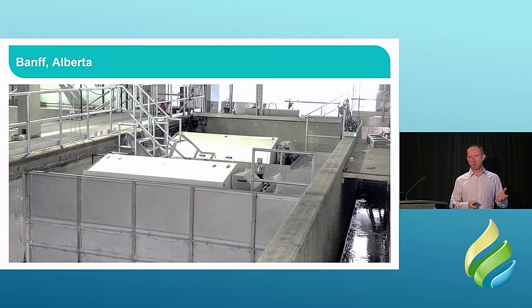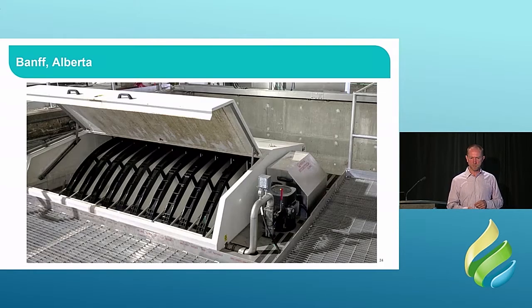But other than that, it's a pretty typical installation. Very easy to do in terms of channel modifications. There really wasn't much to it. It fit in the existing hydraulic profile, so really very simple. The entire project came in at about $1 million, and that was the full design build cost, so everything installed. Of that, the filters are about half of it, so very cost effective. As I was saying earlier, in terms of value for money, these filters give you good value for money. Another photograph, just a little bit closer picture of one of the filters there.